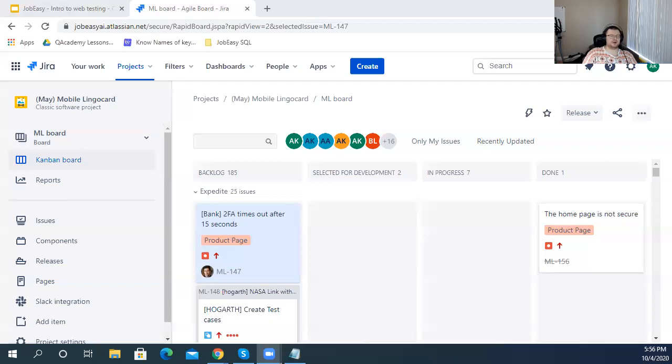So in Scrum, you have something that's called daily meetings or daily stand-up that lasts 15 minutes. The whole Scrum team, and again, it's a small team, about 3 to 9 people, get together in the circle and talk. Within those 15 minutes, everybody should say what they did yesterday and what they're planning to do today. Those meetings are called daily scrums. The person who facilitates the overall Scrum process is called the Scrum Master. The Scrum Master looks over the JIRA board, looks over the daily meetings, and helps facilitate the process overall.